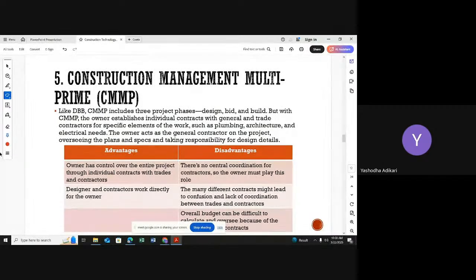Likewise, we are hiring different gangs to the project. Right? They are all working under the main contractor. They are all the main contractor's selections, not the client's selections. The client is signing the contracts with the main contractor. Right? In this procurement method, there is a small change to the system. In this method, the client is going to select all the subcontractors, and the client is responsible for that. That's the difference.